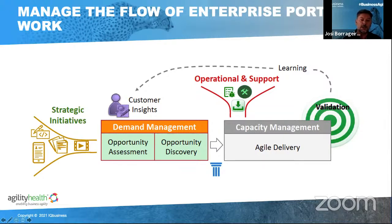And what you would typically do then is build an epic hypothesis statement that would describe this particular initiative effectively. It will talk about the benefits of moving from the status quo to a future state. It would talk about the indicators, the leading and the trailing indicators that you would use to validate that hypothesis, and touch on some of the non-functional requirements for that particular initiative.